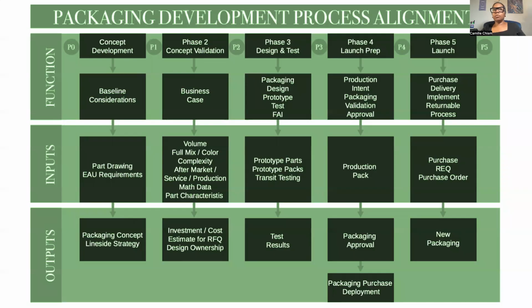So you have to know when purchasing is officially giving contracts to those part suppliers so that you can start working with them immediately and make sure the packaging is meeting the standards and requirements of your company, whatever you've designated from a packaging team standpoint.